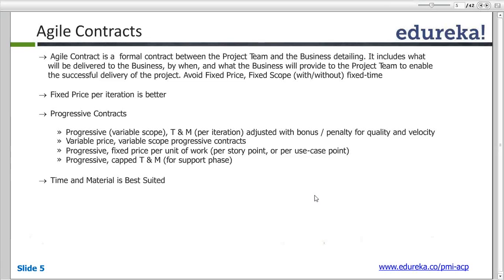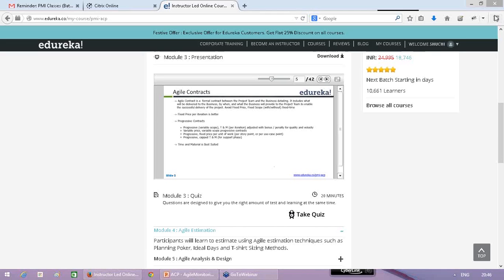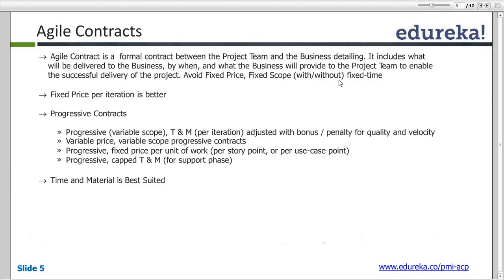There are also contracts with variable price and variable scope, and fixed price per unit of work. For example, we charge on the basis of a story point. A story point in Agile is used to describe the complexity of a requirement — we define that complexity as a story point.